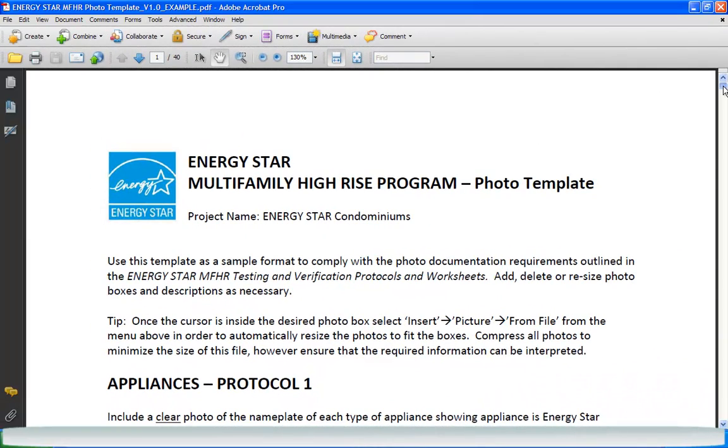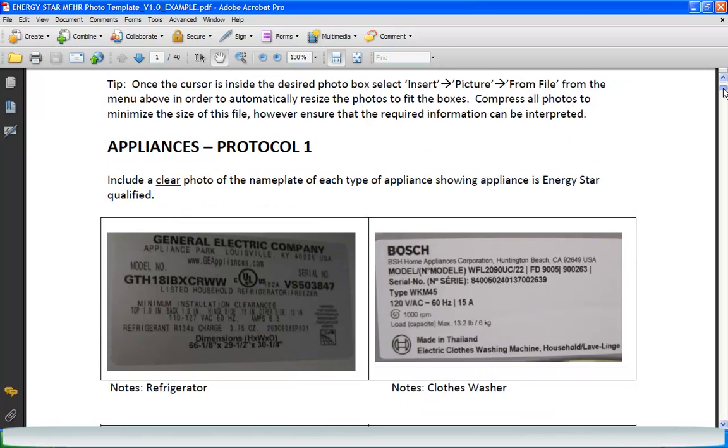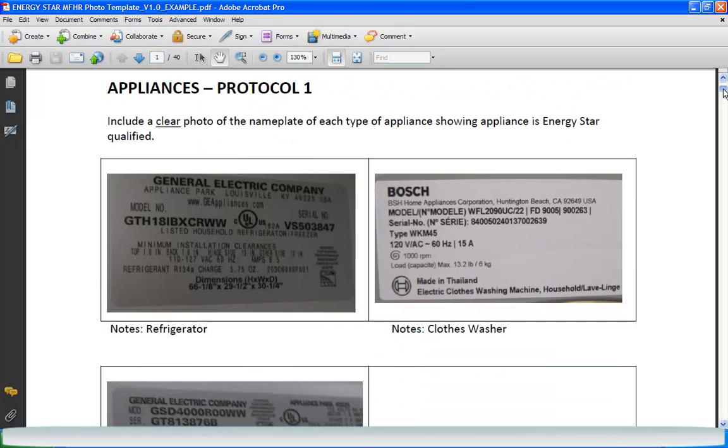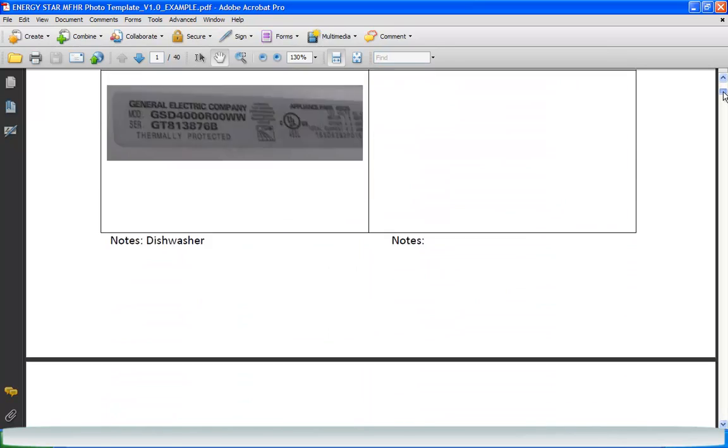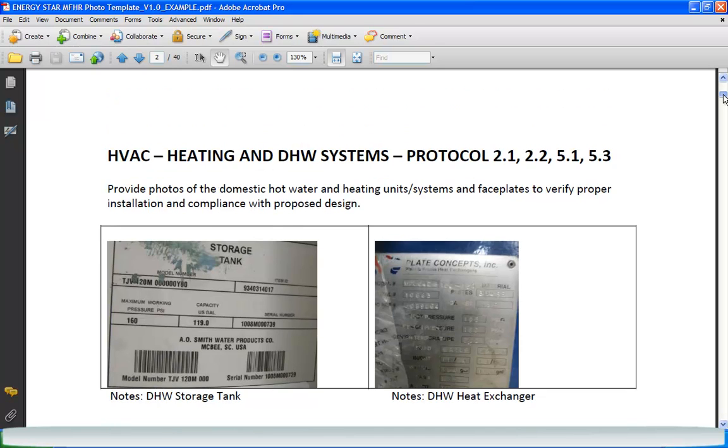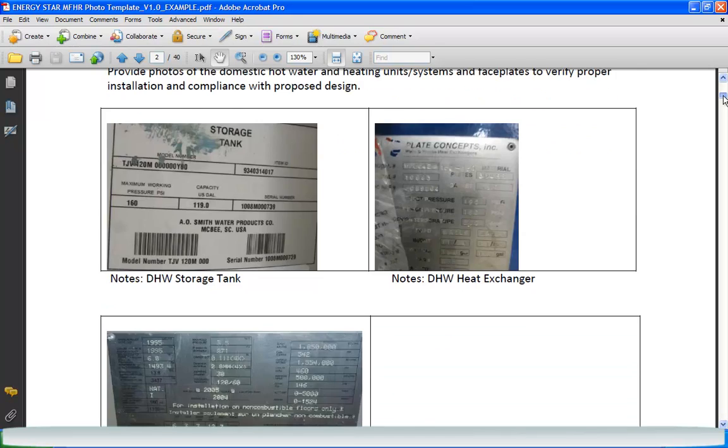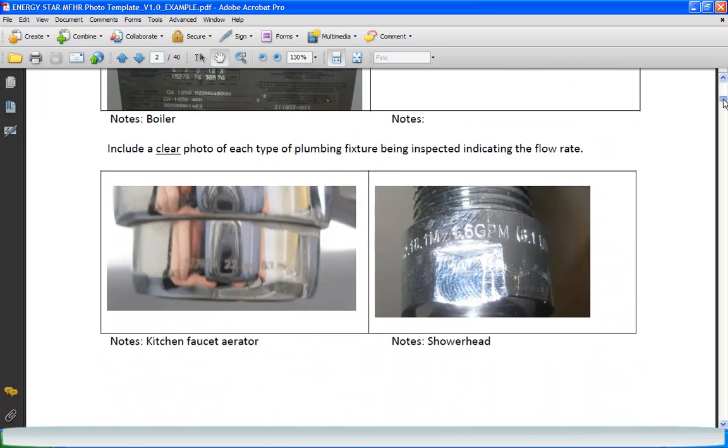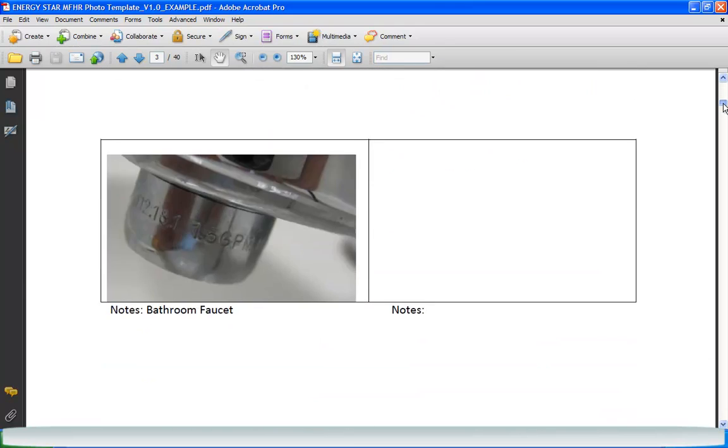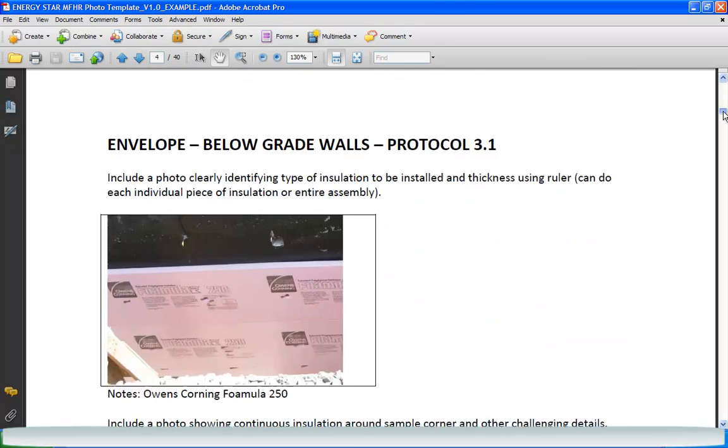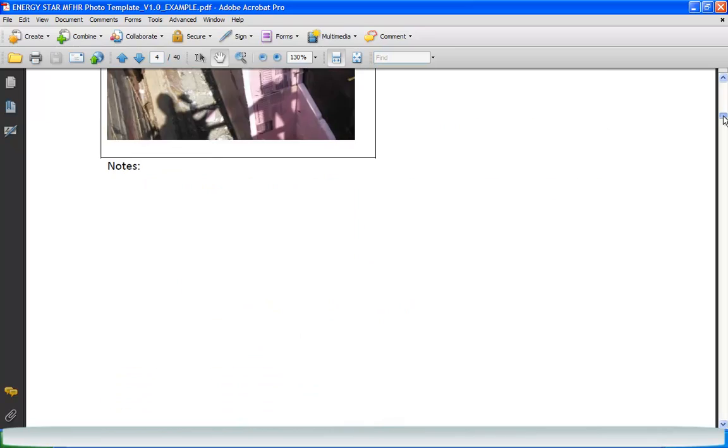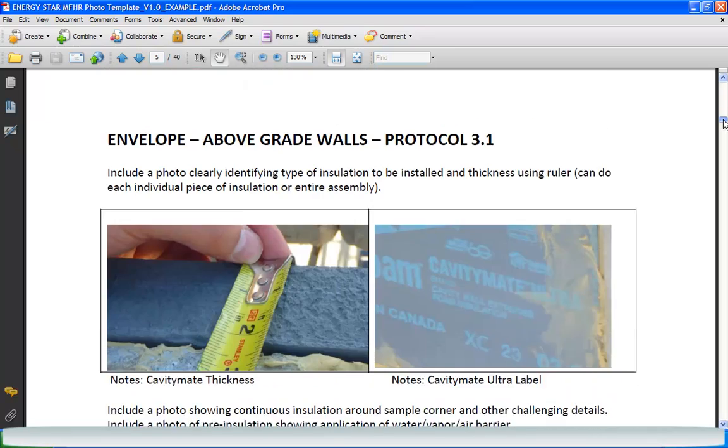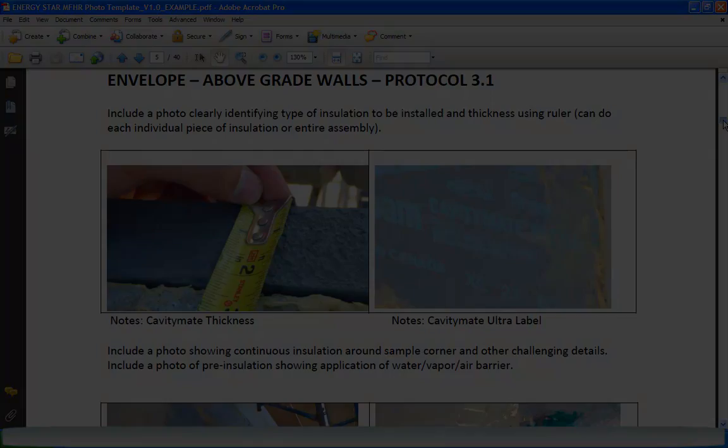The photo documentation must be submitted to the EPA or its designated agent at the end of construction. However, the photo template only needs to be submitted for the developer's first three buildings that participate in the program. Also, if the licensed professional validating documents has successfully submitted at least three photo templates, the requirement is also waived. However, all photo documentation should still be kept with the building file in case requested by EPA.